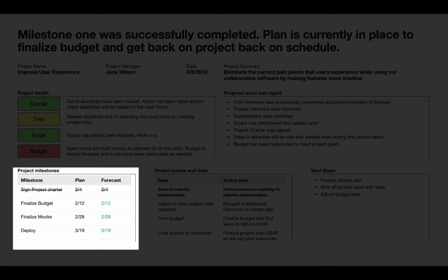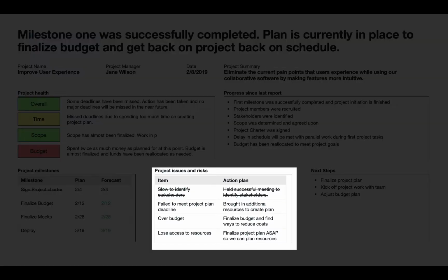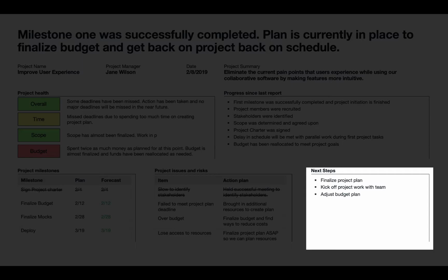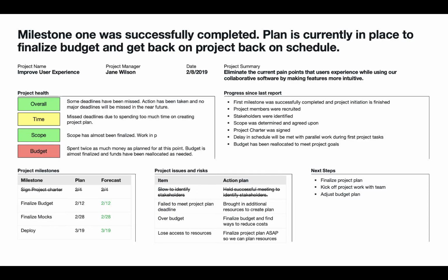doing time-wise. Right next to it, there's space for listing crucial issues or risks. Keep in mind to always present an action plan on how to fix a particular issue or encounter an identified risk. If you don't have an action plan yet or need help from your management, here's the place to ask for support. The last piece of content is an outlook on what tasks will be focused on until the next report.